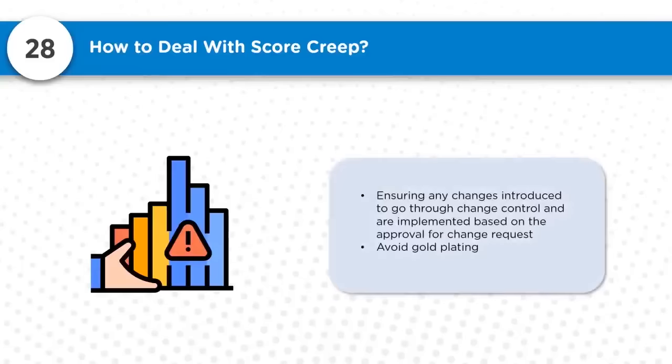Ensuring any change introduced goes through change control. So no changes without proper approval by the authorities, so that only what is required to be implemented is implemented, and that is done formally through the formal change request.